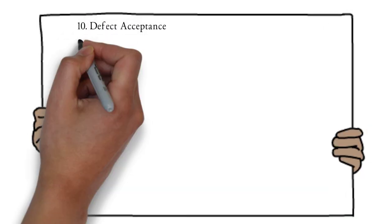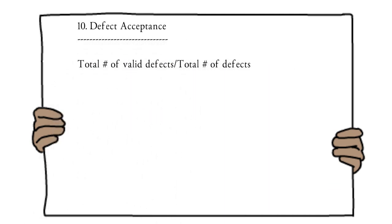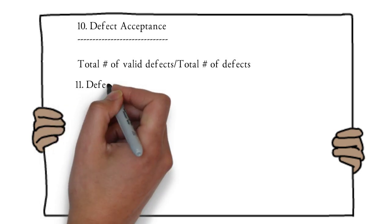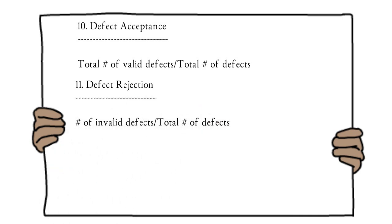The next metric is defect acceptance. Testers may raise both valid and invalid defects. To find the percentage of defects accepted by the development team: (total number of valid defects / total number of defects raised) × 100. Similarly, invalid defect percentage = (total number of invalid defects / total defects raised) × 100.